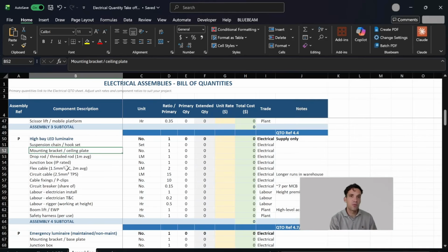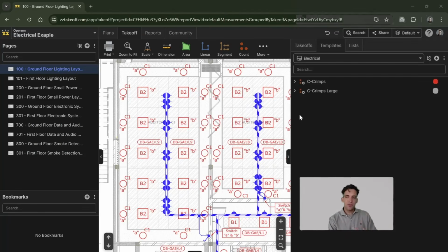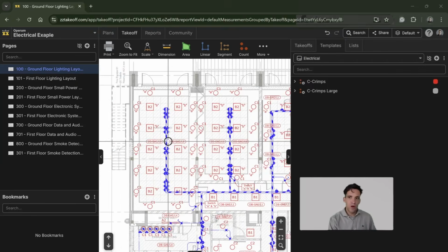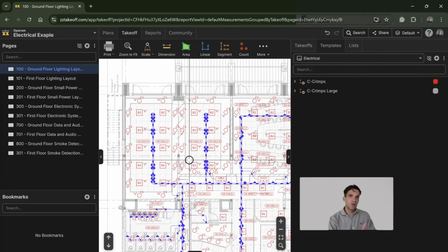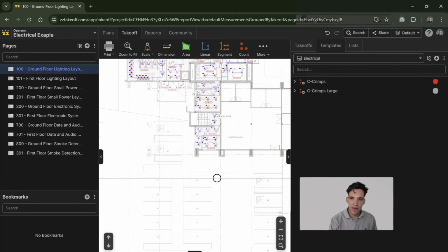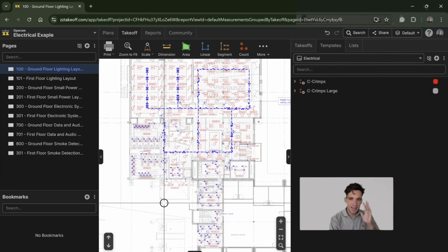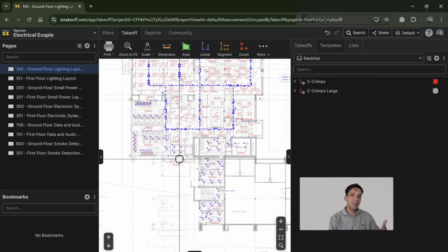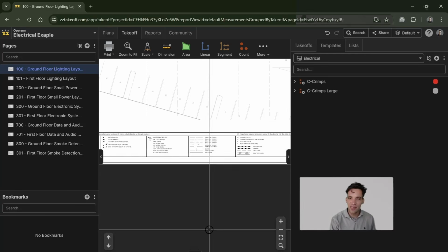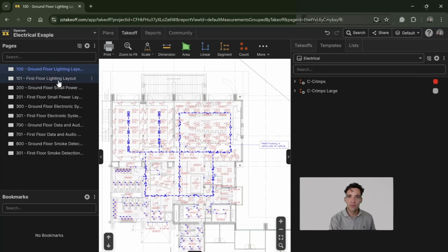If you're doing this for procurement and for the purpose of buying the light fittings, that doesn't actually matter. But if you're doing it for construction and installation, you have to think about what are all the different productivity rates, what are all the different access requirements, plant requirements that we'd need for these different tasks. So to make this really simple, I'm going to do two examples, one of measuring light fittings, the other one for measuring linear meters of cable tray. And again, the actual measuring act is the easiest. The bit you really have to think about is how you set up your individual assemblies.